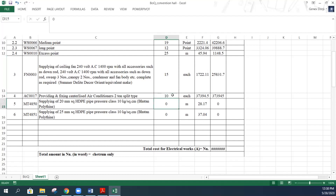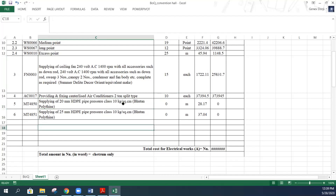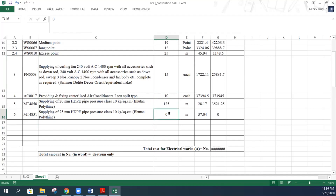For the AC, the number of units is 10, and the cost of each AC is approximately Nu. 37,000, giving the total amount. Similarly, for supplying 20mm diameter HDPE pipe, the quantity is 125 meters. For the 25mm diameter HDPE pipe, the quantity is 50 meters. We have now entered all the required items in the BOQ.